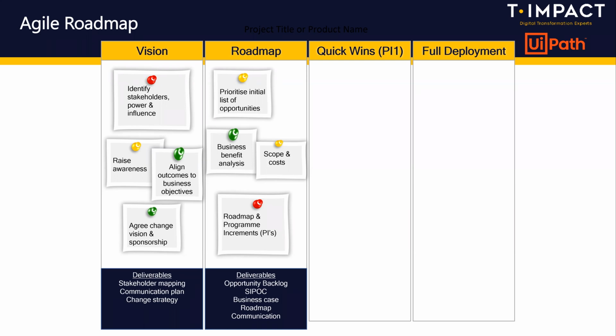And we do that with an organization assessment. It's a one-day workshop. You really want to understand the business benefits. You want to understand the scope and the cost, because with that information, you can determine what the net benefit is going to be and what your return on investment is. Which is really useful when you're challenged for resources, to get sponsorship and to get resources allocated, and then when you're challenged for resources throughout the delivery.